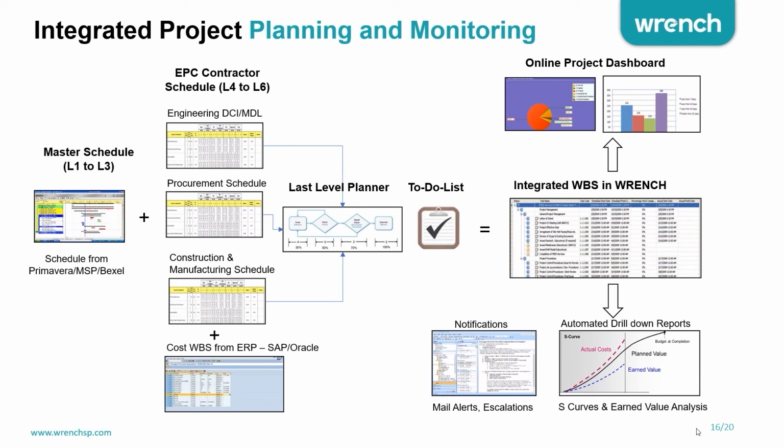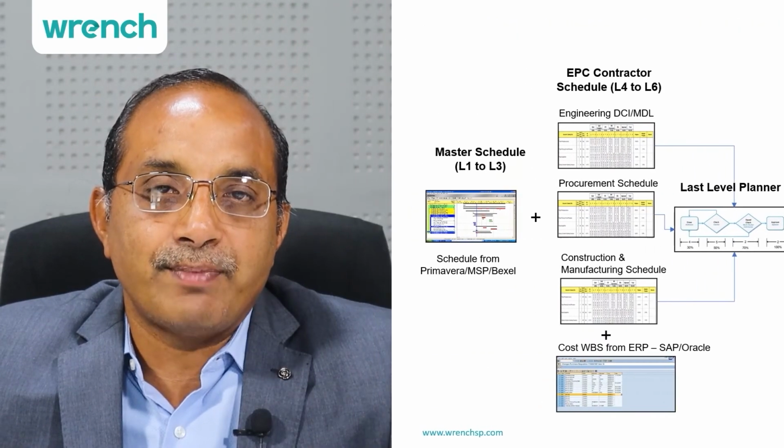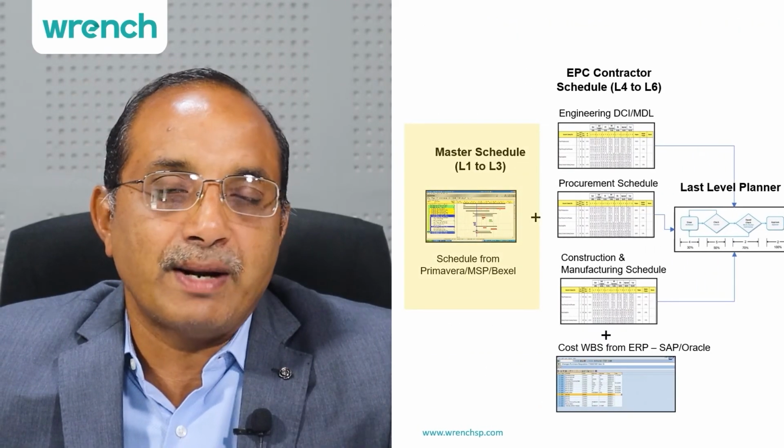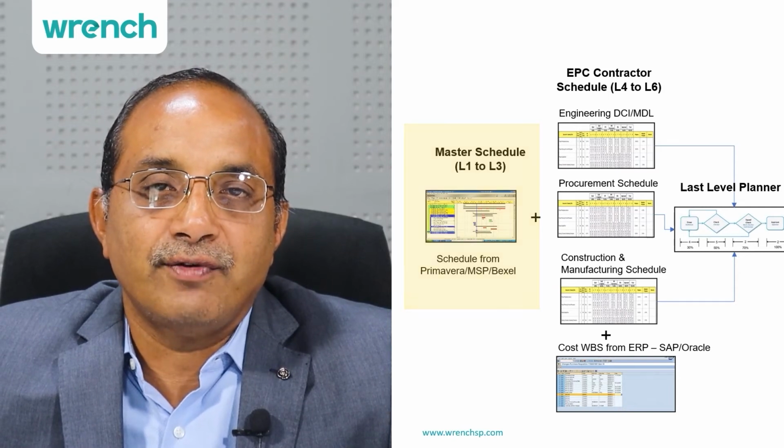The most important thing is how is this information getting to the dashboard? So this data flow will explain this. For the schedule and these milestones, you have your overall schedule coming from your planning software like P6 or Primavera, SmartProject, Pexel, or whichever application you are using for planning.